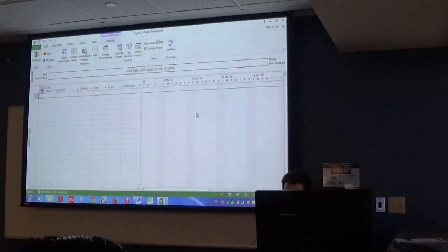So you'll see here that it's gone through and set up as per our 40-hour work weeks. There's a gray area on Saturday and Sunday, which is very important. We're assuming that we're not going to be working Saturdays and Sundays. Even though it can allocate through those, it's not allocating the actual resources on those dates. So it might show that it's running through those, but you'll just have to know that no one is actually working on those days.